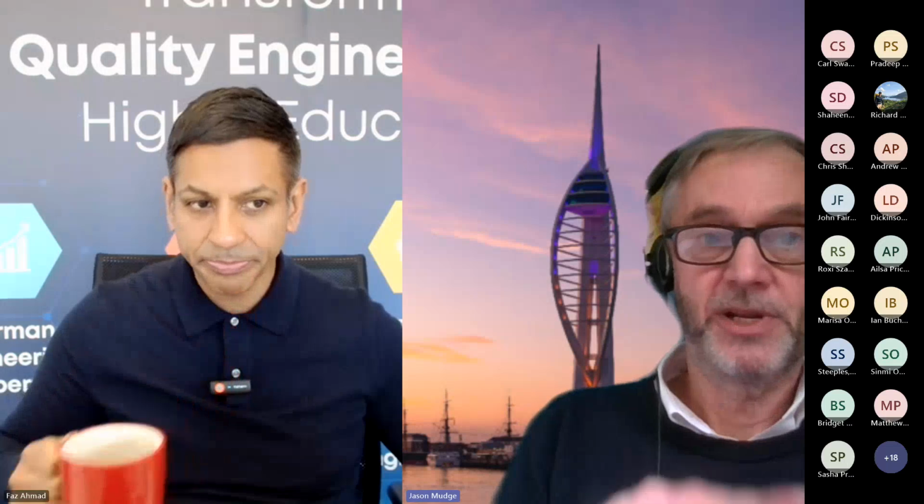We boiled that down into a really simple guide that we give to programs and projects. Map tests to requirements, design tests, use Excel, whatever you need. What is the expected result? Before you test, you absolutely need to decide what the accepted result is. Otherwise, what are you testing against?